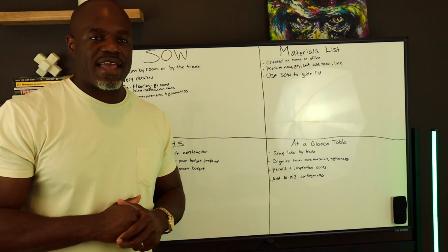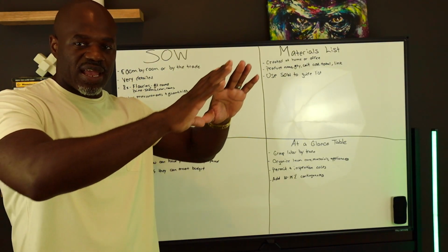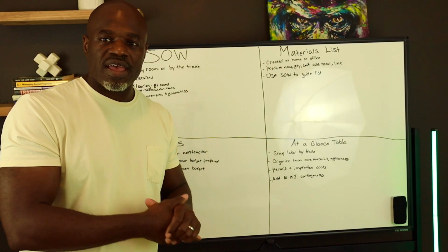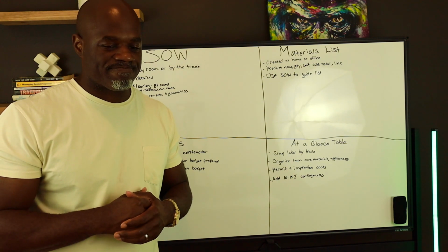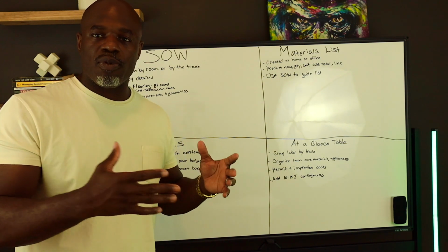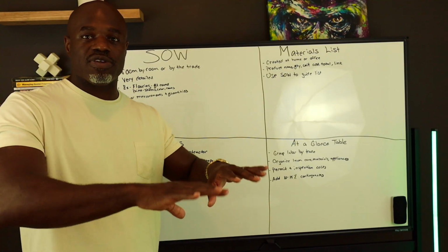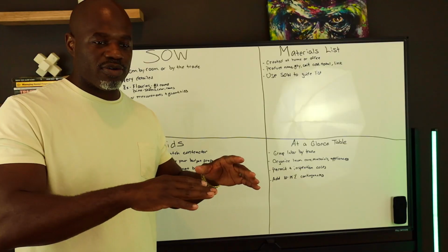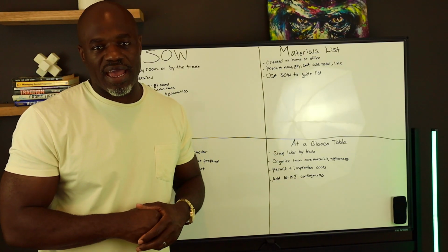We also had another contractor whose way of finishing out around the window, whenever we're putting in a tub surround, we were used to. A new contractor that we used was capable of finishing out that way, but since we didn't necessarily tell him, we assumed that he would do a professional, nice finish. He didn't. It was all exposed. There were no trim pieces or anything. So he had to come back and fix it.